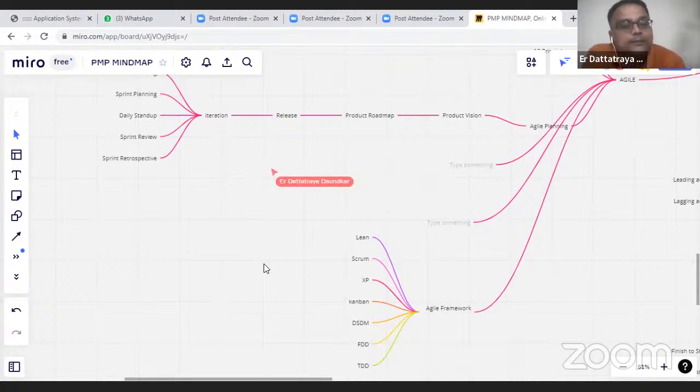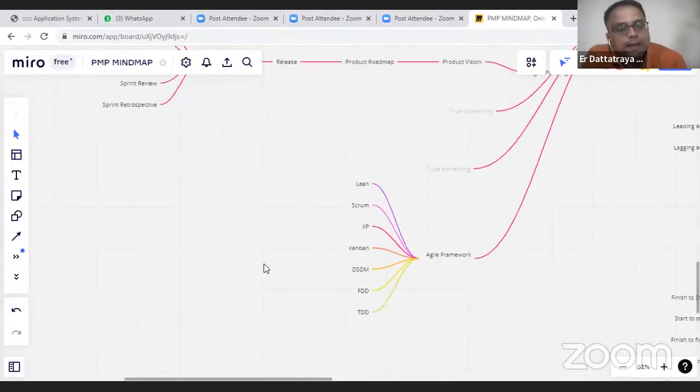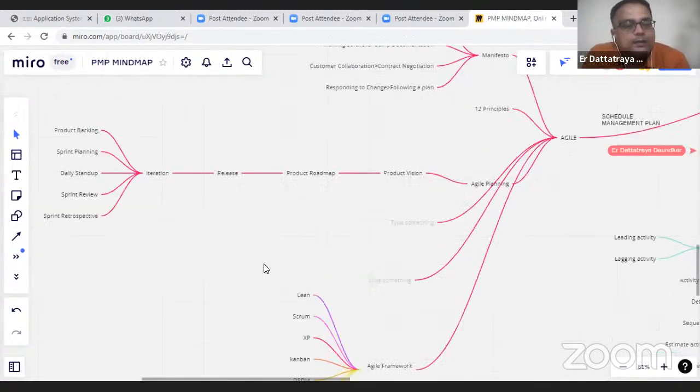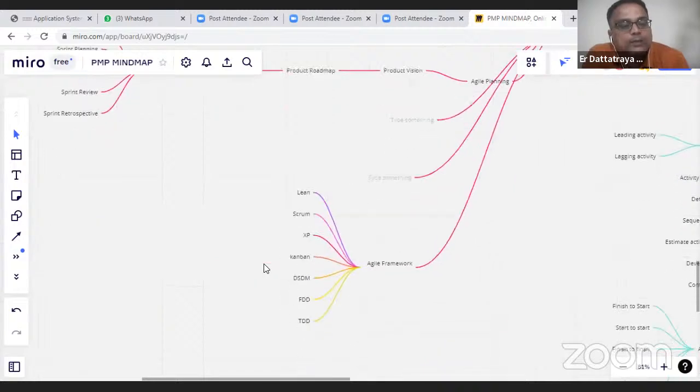And then at the end of the sprint, the product owner, customer or the sponsor, and the team and Scrum Master all gather at one place to review the products. Whichever user stories are 100% complete, only those are included in the presentation to the client, and the incomplete stories are left out, and then they go to the next sprint.